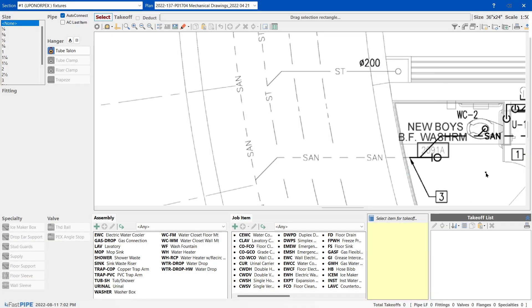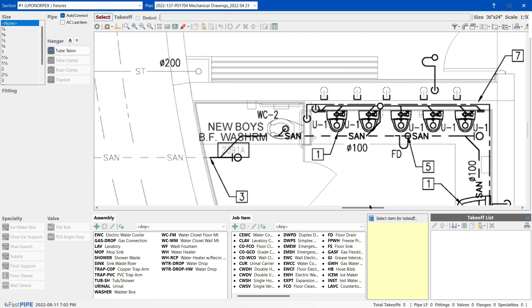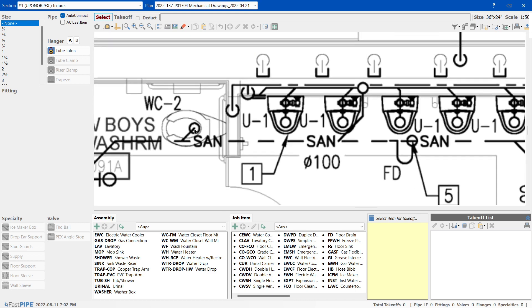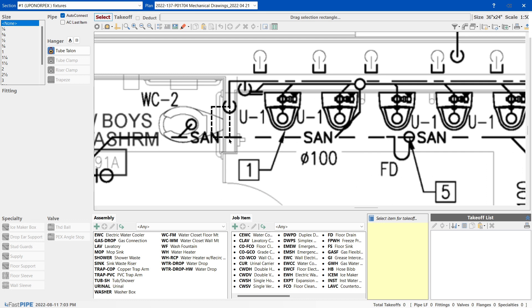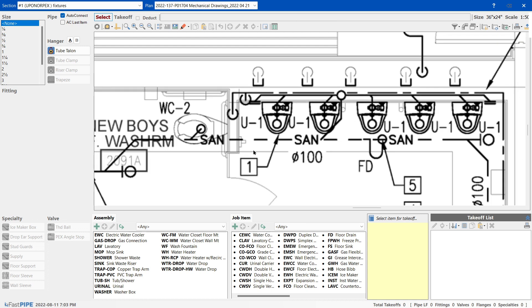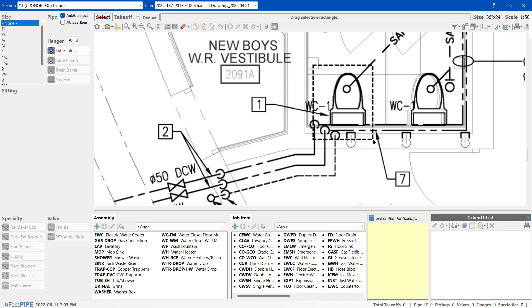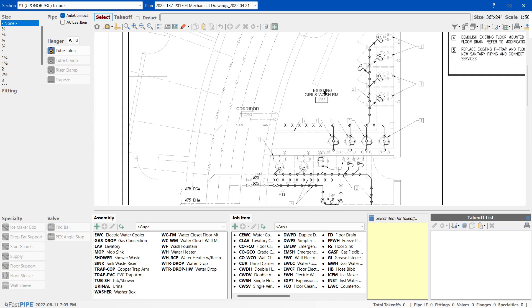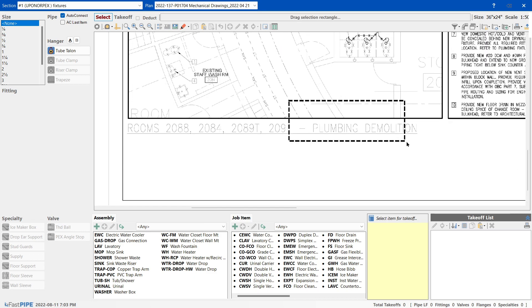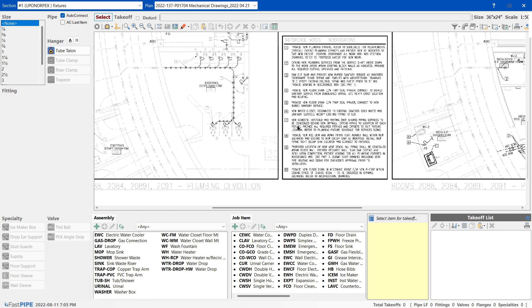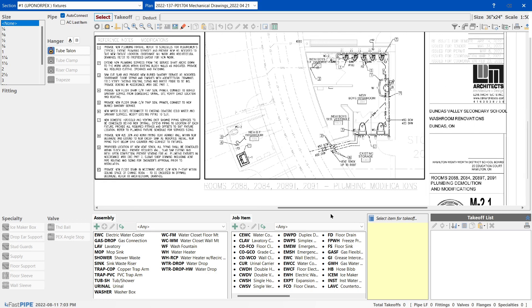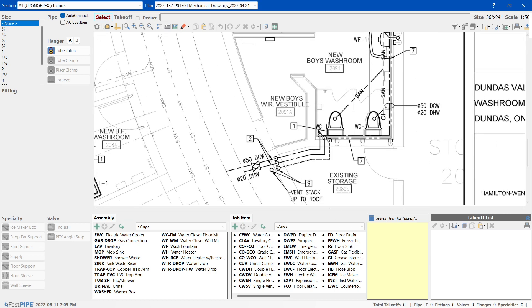This is WC2 - what they mean and what type that is we're going to show in another video. Here you can see a water closet - it's a toilet but it doesn't have a tank. If you're new you wouldn't recognize that, but what's important is what's in the specs. Right now our step is we're going to do a quantity test. If I read this drawing it looks like a demolition room, and then it's the same room because you can see a washroom here and washroom here - similar - a wall here, no wall here, so that's why it's new.